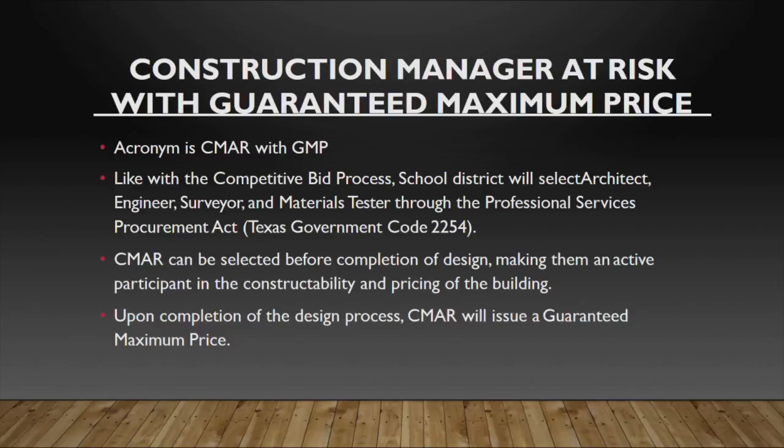So we usually have 4 different timelines where we say, okay, at 25%, 50%, 75%, 100%, are we on point? Are we on scope? Are we on budget? Can we build this? And the CMAR is also very aware of construction reality. Is the staff available? Is the expertise available?